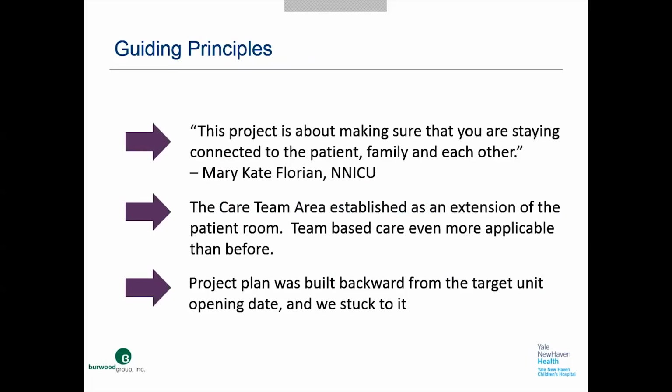Lastly, we had an extremely short timeline. Our go-live date was determined based on several other construction timelines, so we had to meet that goal. Our project plan was developed backwards from that date. There was very little flexibility, and all resources had to be dedicated. Next slide.